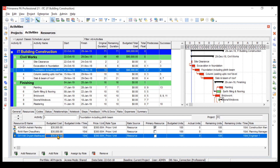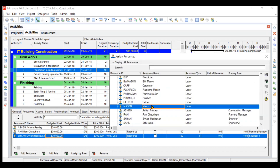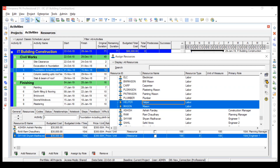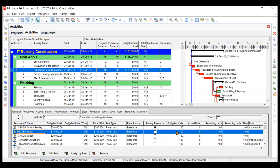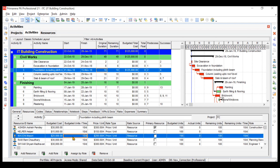Next, we need to add 2 masons and 1 helper. We will first add 1 mason and 1 helper. For the helper, since only 1 is required, budgeted units are 100 — 10 per day multiplied by 10 days. For masons, it is 10 per day but we need 2 masons, so instead of 100 budgeted units we will make it 200. You can see the effect — the budgeted cost doubles from 20,000 to 40,000 because we included 2 masons.